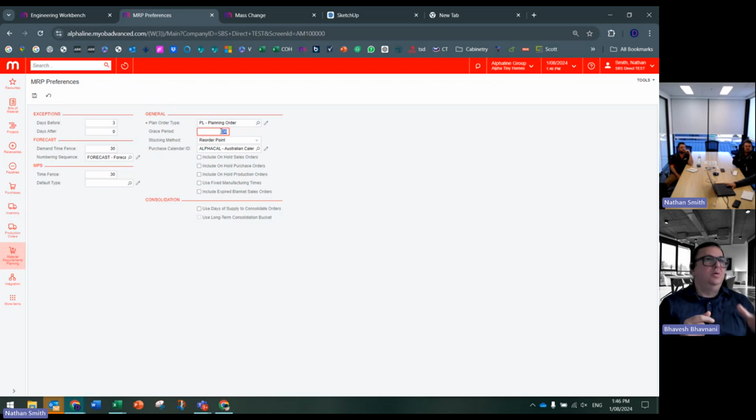Sorry, really quickly, how come we're not creating sales orders? Because in your case, you're creating projects. Your demand is coming from that project, and then it's linking to a production order. It's not coming via a sales order. The project is required for project billing, stage billing. Stage payments need a project. Yeah, got ya. Okay.